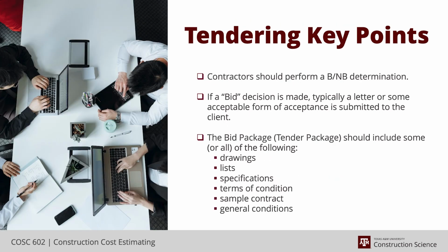So some key points: as soon as the project invite is received, as soon as possible, you want to run through a bid/no-bid determination. A lot of the times, it's an automatic bid decision as soon as we receive it, and we're going to do a study or an overview of the project to see if we need to make it a no bid.